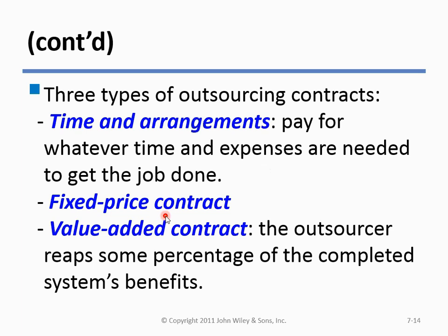Right? And fixed price kind of is on the other end. We'll give you X to do Y. Okay? Just think about the role that puts them in. Make sure you define your X. They'll be motivated, and I've been on that side, and we've got to pay our bills as a consultant and pay our troops and have a little profit for the practice. And if you tell me it's going to be $10,000, I will get it done, but I'm not looking at ways to increase your wow value. I'm looking at ways to keep the margin up.